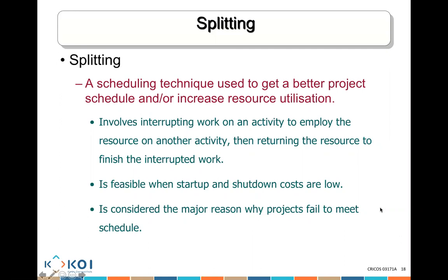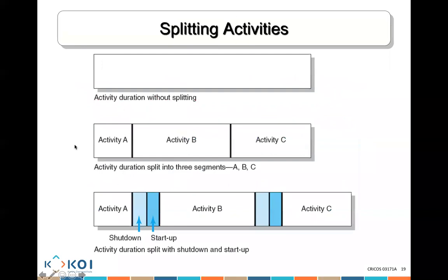So you need to be very careful on that, because a lot of the time when you are splitting an activity, I split it and then I start, I split and then I start. Every time you stop and start, you would usually be adding time. So instead of the project taking that long, because you're stopping and splitting, it is increasing the duration of your project. It's going to take you a longer time to really get the job completed. So that's something to bear in mind. Splitting is not necessarily the best way, because it could delay the finish of your project.